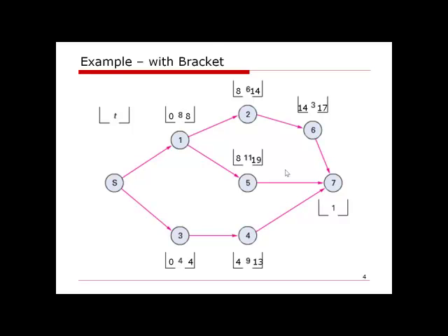So here we have activity 6, the early finish is week 17, activity 5 has an early finish of week 19, and activity 4 has an early finish of 13. Now we see that activity 5 will finish last, in week 19, which means activity 7 cannot be started earlier than week 19. Although activities 4 and 6 will finish earlier, activity 7 needs to wait till all three activities are finished.